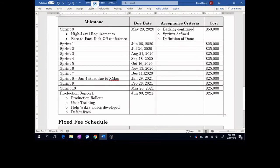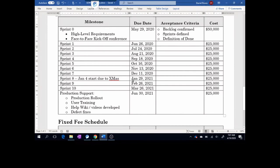Sprint seven ends in mid-December, and you have to be careful of this — it falls around Christmas time. Traditionally in organizations this is a very slow time: you're fully staffed during the first two weeks of December, but after that it's give or take because everybody goes on Christmas vacation. So the assumption here is that we agreed with the vendor that sprint eight won't start until January 4th of the next year. Certain organizations also have production freezes, and even the vendor may have a production freeze. So this is one of the things you need to find out and plan for — which is why there's such a large gap between sprint seven and sprint eight.